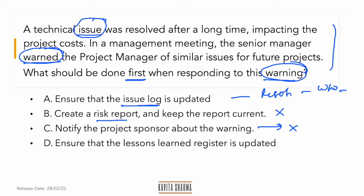'Ensure that the lessons learned register is updated' — yes, this is also something you need to do. But the question asks what is the first thing you would do. The issue log becomes the lessons learned as well — it goes to the OPA. The lessons learned register can be updated as and when the retrospective meeting happens or whenever your team gets time.